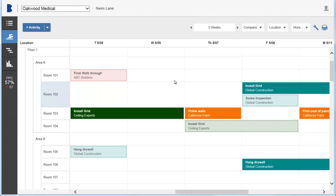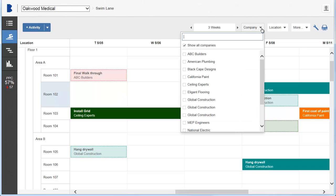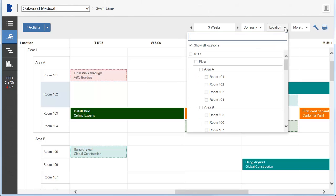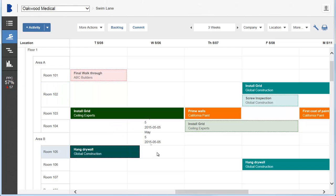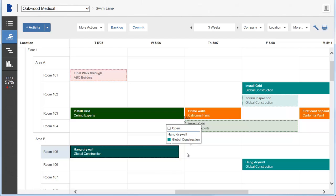You can use the filter and sorting tools to view by location, company, work breakdown, and more. You can drag an open activity card to change the finish date. Drag the left or right edge of the activity card to change its duration.